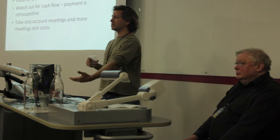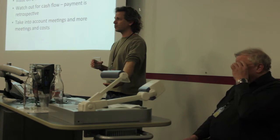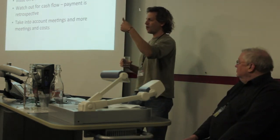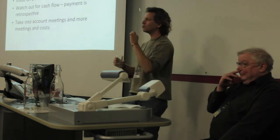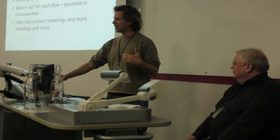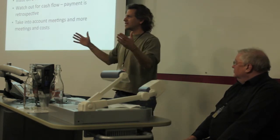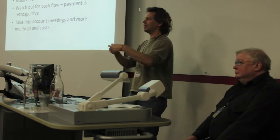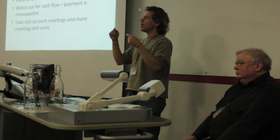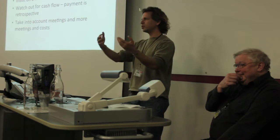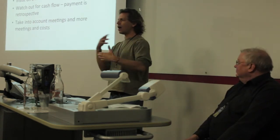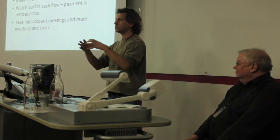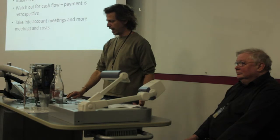These are lessons I've learned. When we put in our first project — the 14 million euro one — we had 1% of the total budget, which made us a really small player. They still had their four meetings a year, but we didn't necessarily have the budget to be at every one of those meetings. When that happens, that puts you out of the loop, and when you're out of the loop you're not able to participate in the same way. So really take that into account — be careful about joining large multi-million euro projects where you're a small player.